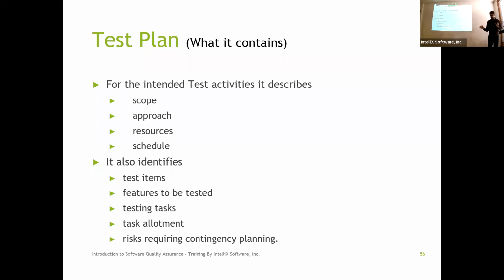For example, if you're building a single story house with a patio in the back, typically the contractor will ask, is the patio part of the contract? Or I'm going to build a house and then have somebody else add a patio later. That's nothing but a scope. Same thing here.